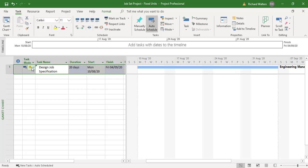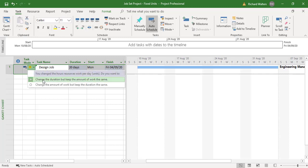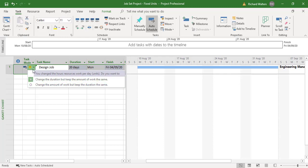There's a little message here with a warning sign. This is the effect of fixed units — if you click the drop-down arrow it wants to change the duration, which is the default for fixed units when you take resource away. Or if we didn't want that and we wanted the same duration but wanted to decrease the amount of resource, we can overwrite the default. This message becomes very important when you're allocating resources to tasks and changing resource allocation, and it applies to fixed units, fixed duration, and fixed work.